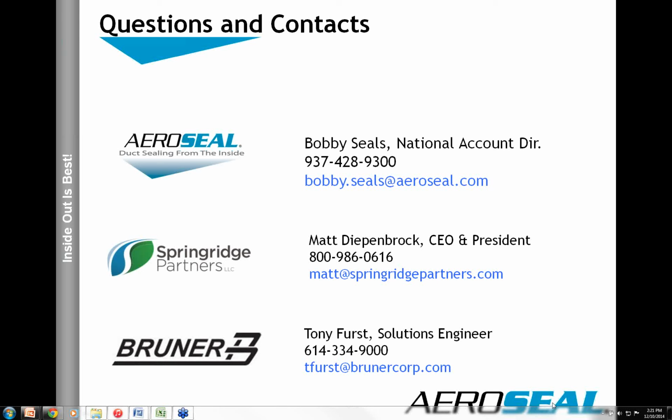We have another question. How much ductwork can be sealed at one time? I'm not sure who that one's from. It came in on the chat window. Is there a limit? Well, hi, it's Bobby again. With one fan box, obviously we're talking about volumetric pressure, volumetric flow rate. And with one fan box, we can do probably about 100 to 150 linear feet. Obviously, if we use gravity, we're going to be doing pretty good here.